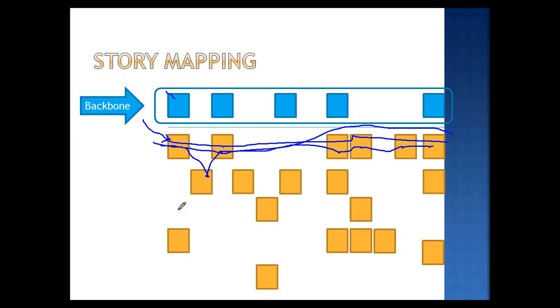So if it's something that is a feature within your system, but is not used very frequently, it's going to go lower and lower down on your list, right? So the least frequent things are going to be down here, and the most frequent things are going to be up at the top, right? So the top, then, you create what we call a backbone. So in this case, this would be the website. I don't know, let's get rid of some of these, so I'm going to whack that one. Say this is shopping, this is cart management, and this is checkout, right? So you'd have these big backbone kind of groupings that you'd lump things into, and then the individual stories go underneath here.